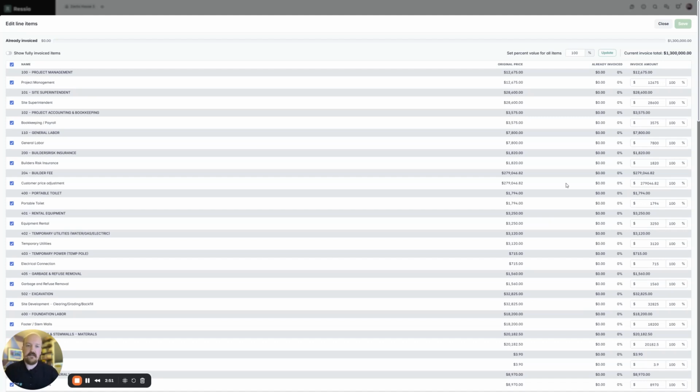The other nice thing about this feature is that when I do things like customer selections or change orders, that customer price adjustment is not being deducted from. It's essentially an amount of money that's been set that's being added on. So if I have a $1.3 million project like I have here that's got that $279,000 customer price adjustment, if I then do a change order for another $10,000, that change order is just adding on top. It's not making up the difference between the two or anything like that. So it allows you to set a flat fee for that price adjustment and not have to worry about whether it's deducting from it or something like that.